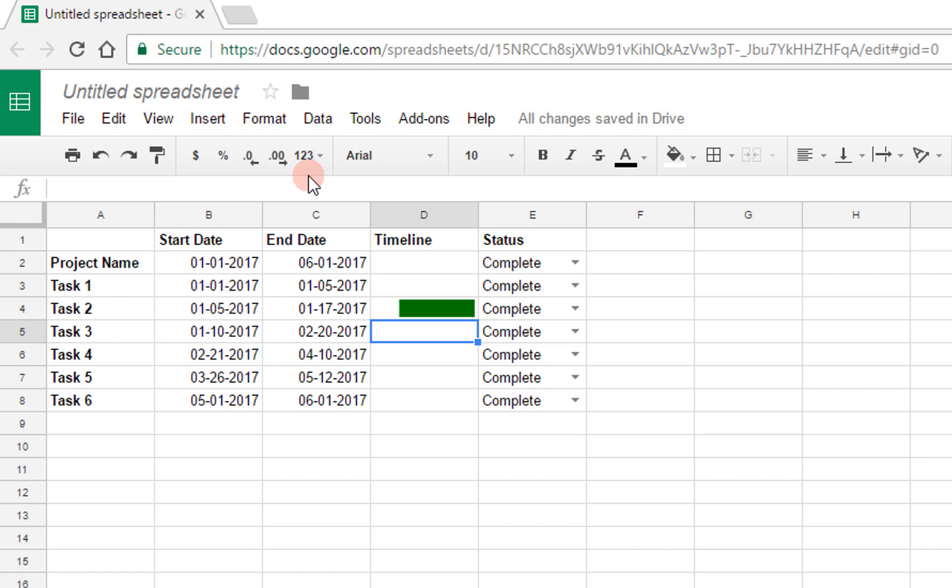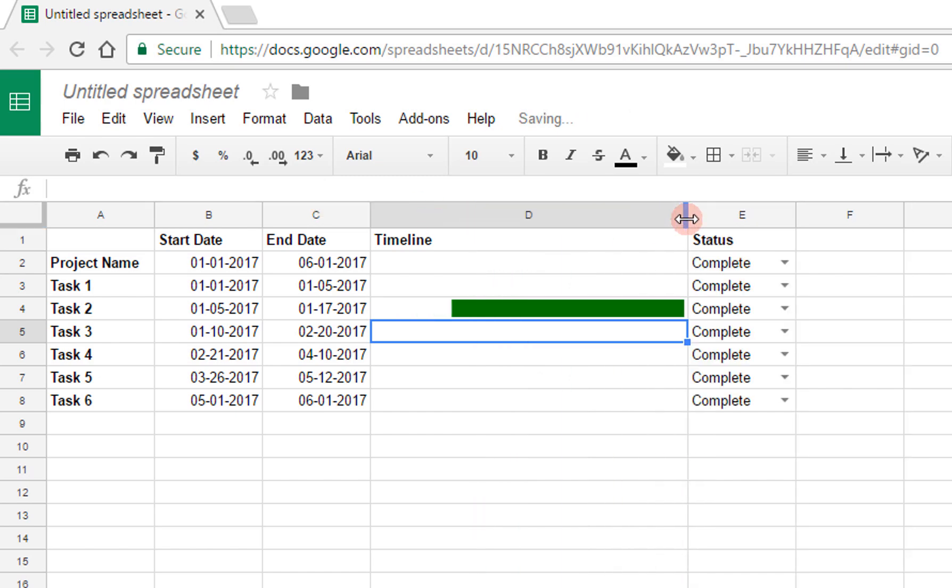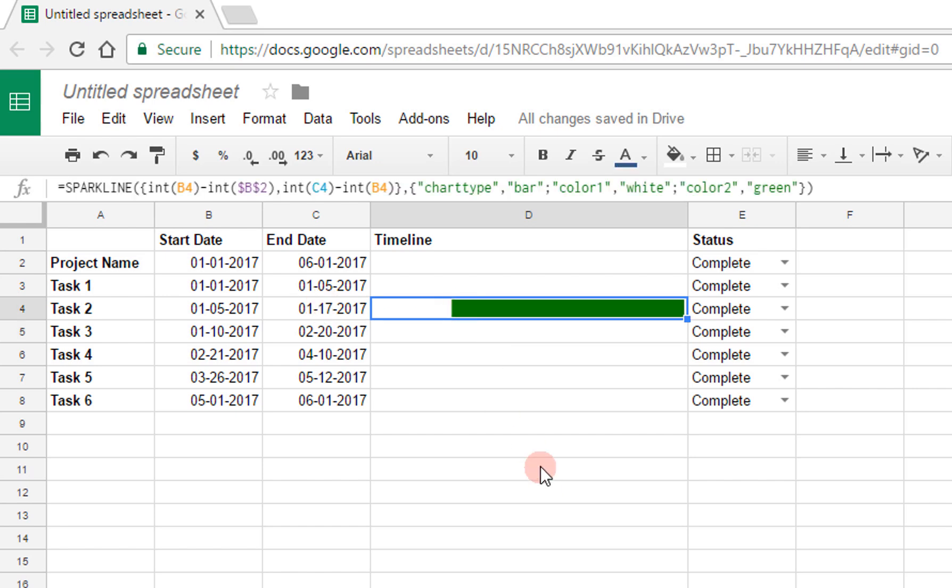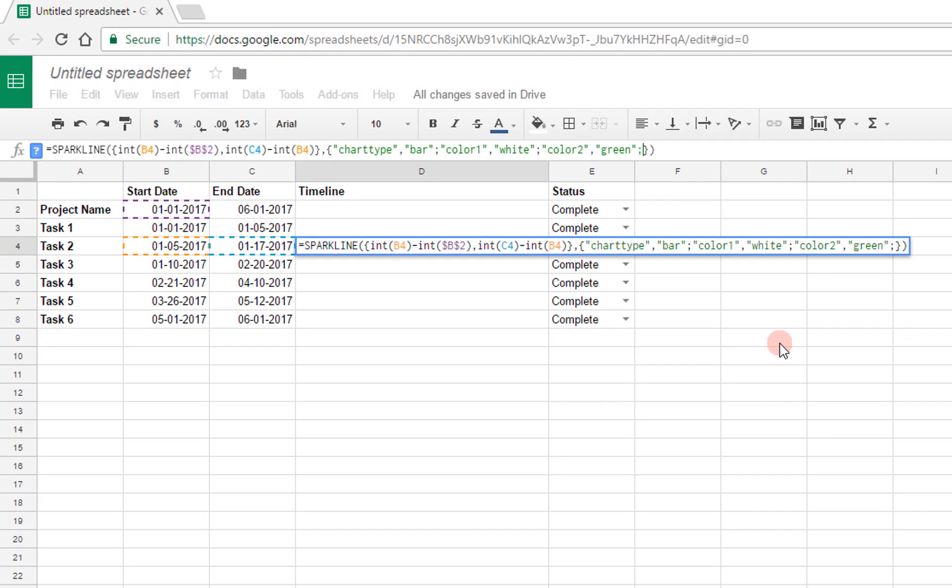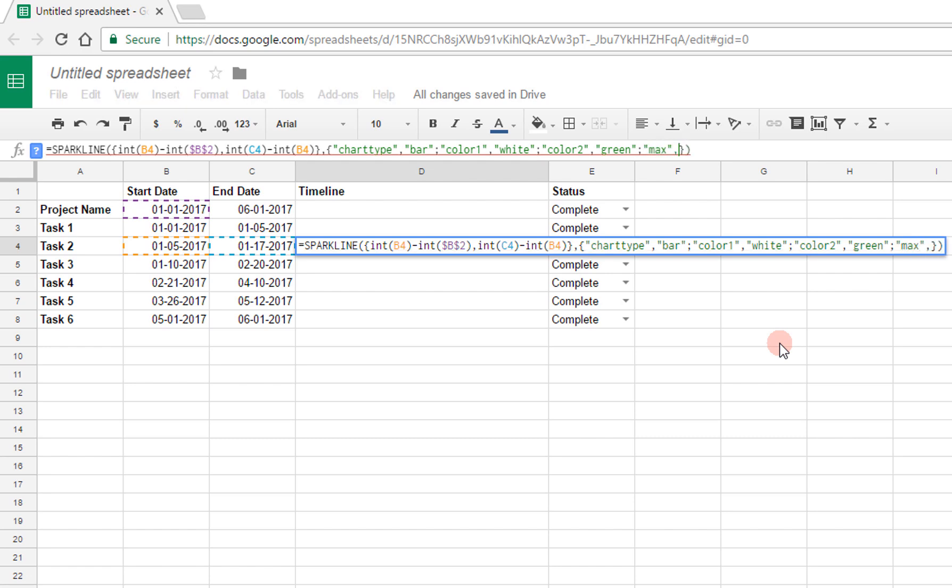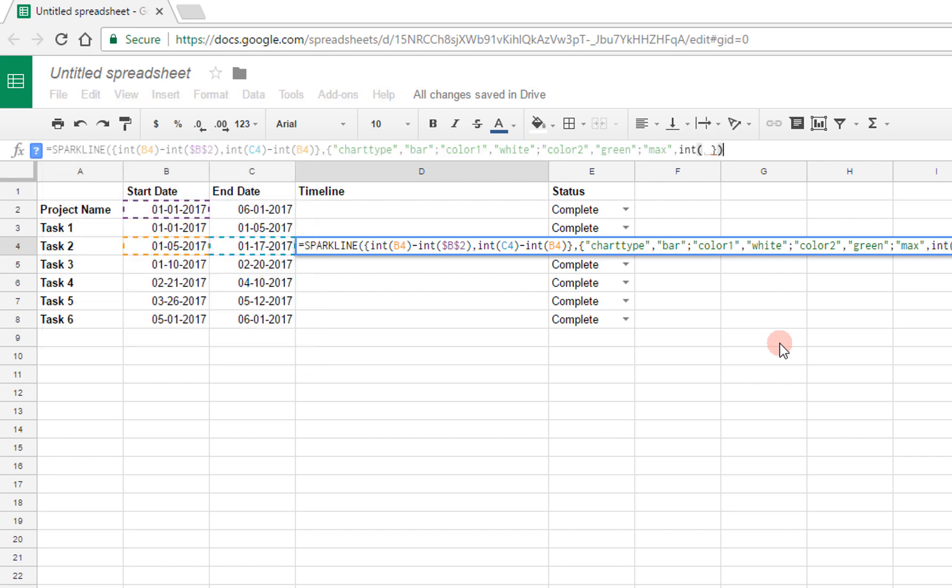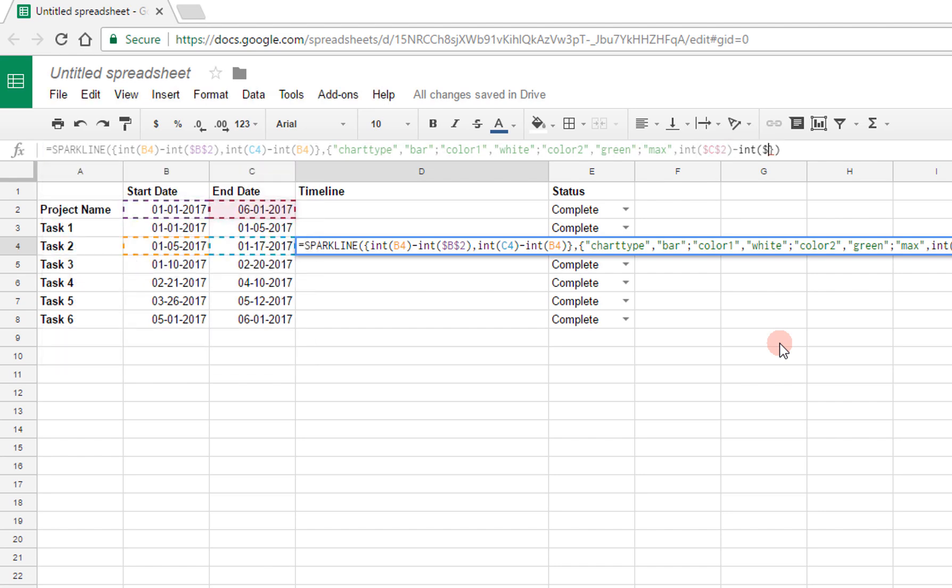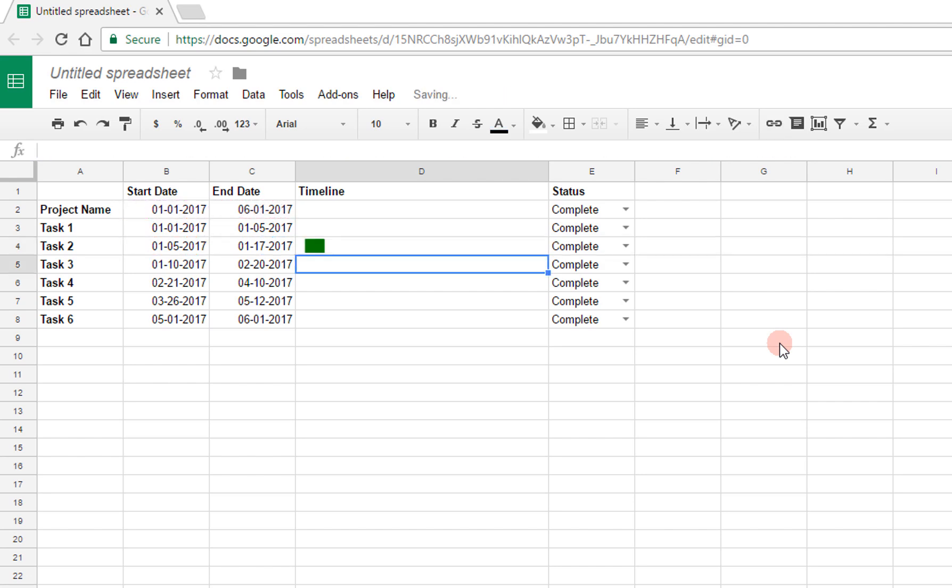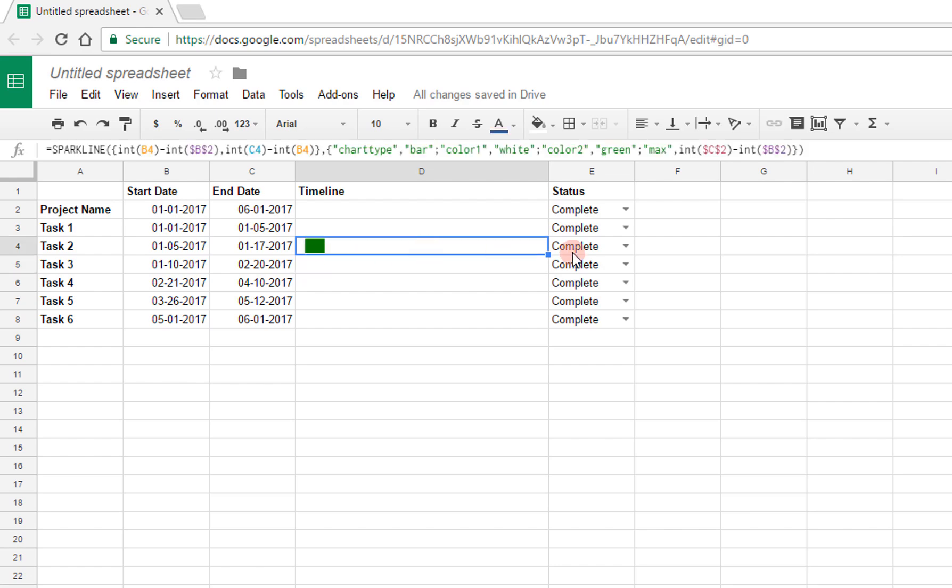However, this is not exactly what I want. So first of all, let me spread this out a bit to make it more clear. What I really want is this entire space to take up the space of the entire project, all the way from January 1st to June 1st, and not just like this, because this currently is only going to January 17th. So the first modification that I'm going to make is after the color, I'm going to specify that I want the entire length of that cell, the maximum, to be int of $c$2, so the entire project, minus int of $b$2.